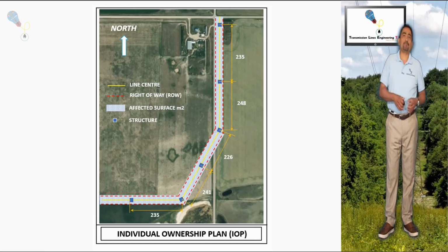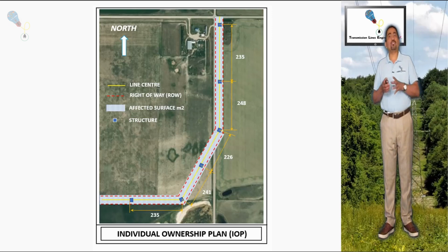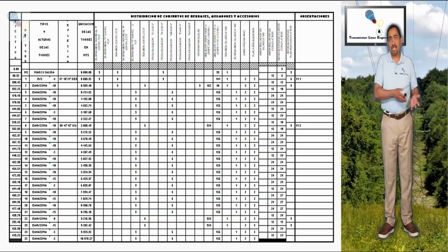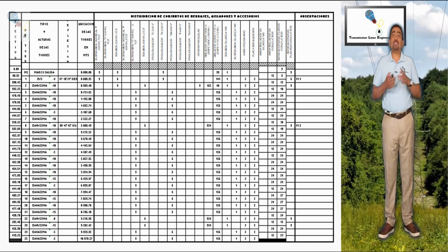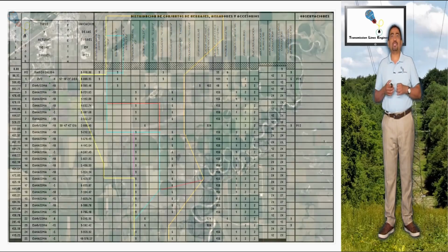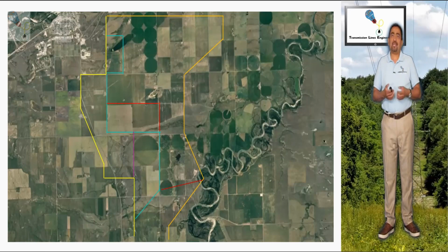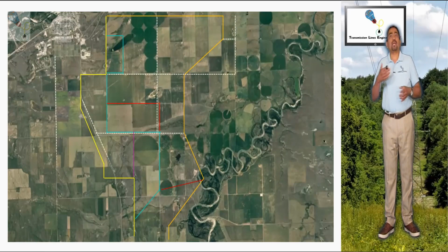Step number four. In parallel to the structure locations on each possible alignment, the contractor, through its engineering area, will obtain material quantifications of structures, cables, hardware, OPGW, etc., and the construction team will determine their very own quantities, access roads, warehouses, locations, etc.